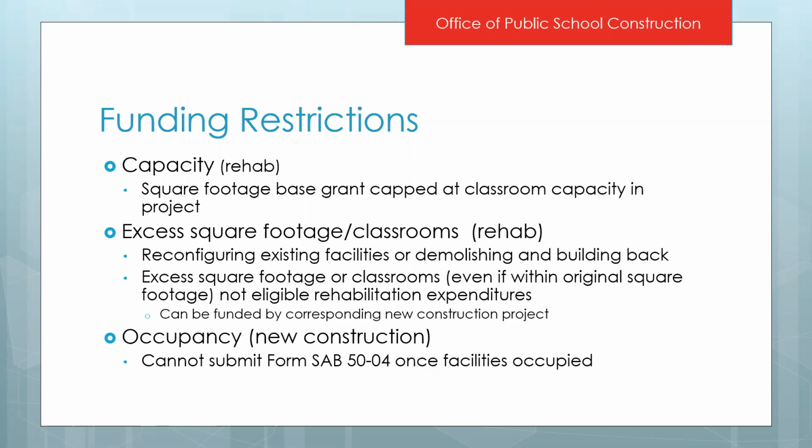And then lastly, for new construction projects, we do have a rule with occupancy. If you are able to start your project prior to submitting a conversion application, you want to make sure you just do not occupy the classrooms for a new construction project prior to submitting that form SAB 5004. Once you do occupy, then the project is not eligible for funding under new construction, but this does not apply to rehabilitation.